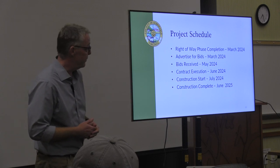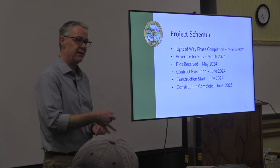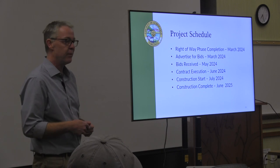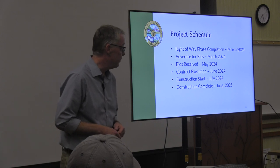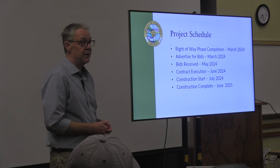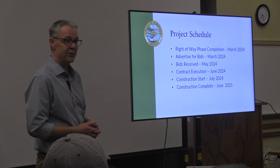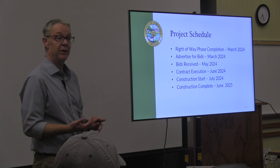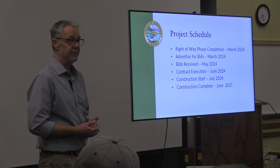So, we're planning, we're completing. There's literally just a little bit of paperwork left on the last property to get processed and recorded so that it becomes our property. And then we will be, in late March most likely, advertising bids. That'll be open to civil construction contractors primarily with other subcontractors lined up. We're hoping for good bids, obviously. It's a $2 million project, just to give you a sense of the scale.